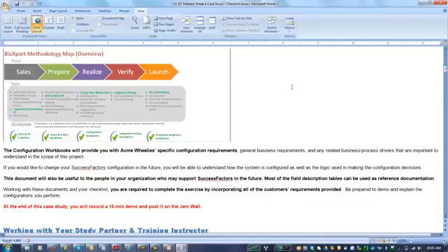Once that is done, the business stakeholders decide whether it is a go or no go, and then you go live, do go-live activities and go-live support, and then hypercare support for some time. Then you take a sign-off, the project is officially closed, and it is business as usual after that.